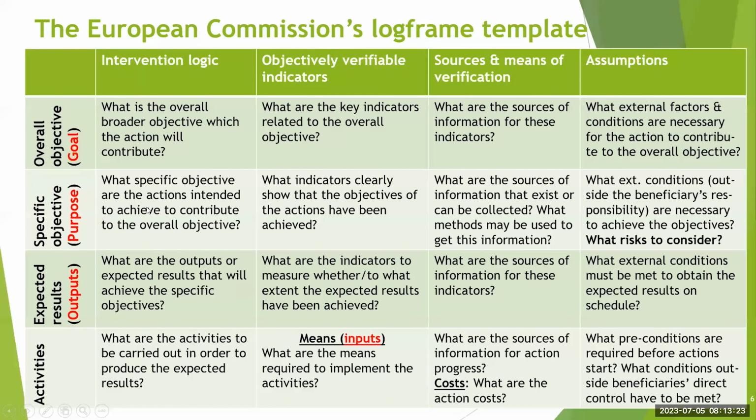And to get this done, you would have to ask yourself, what has to be achieved at the project level before that goal can be achieved? In other words, what are the outputs that will be expected from the project if we want to achieve that goal? And one thing I like about the logical framework approach is the fact that it helps you to distinguish between the project purpose or the project objective and the output or the results, what you want to achieve. So in this case, assuming we want to improve upon the traffic flow at the intersection, the specific output that the project seeks to deliver might be signaling. That is what we can say, yes, the project has delivered this. We have signalized the intersection.